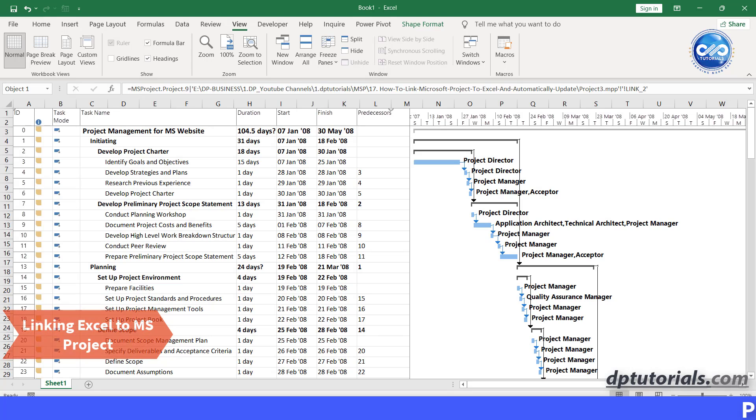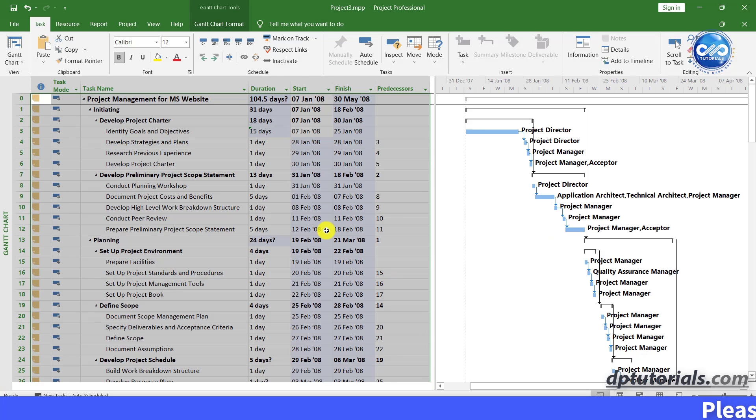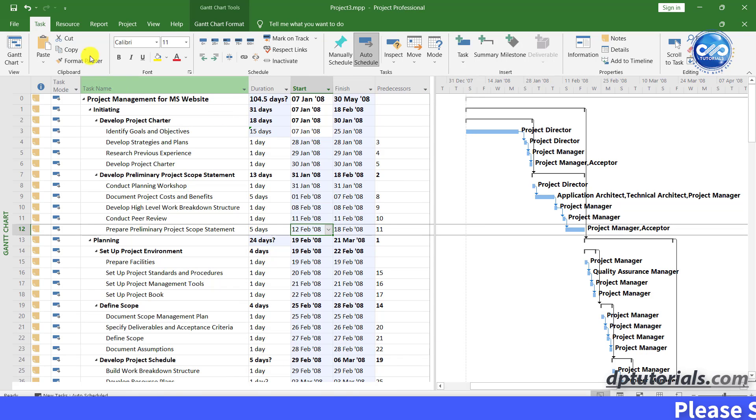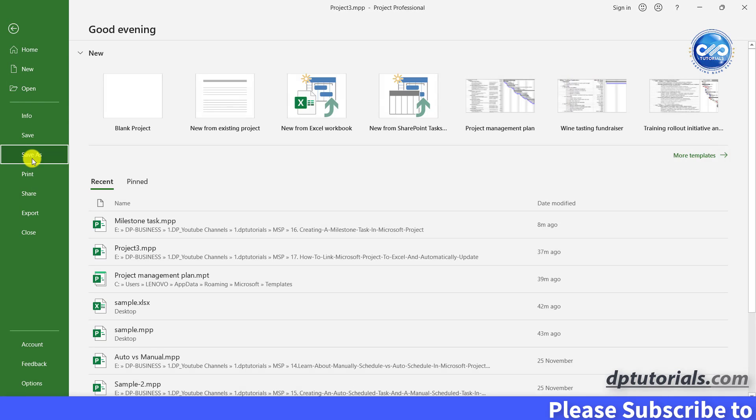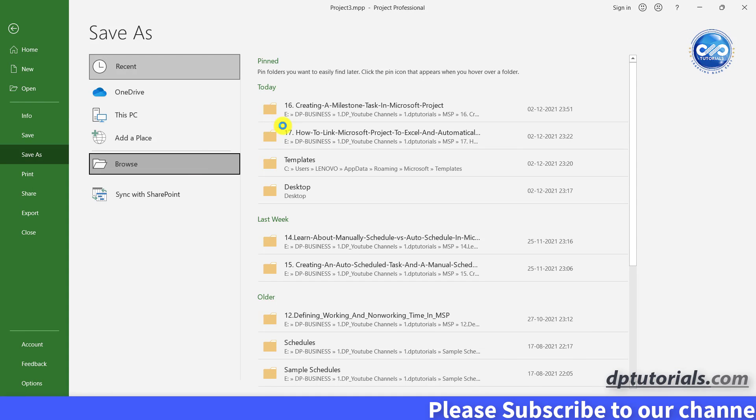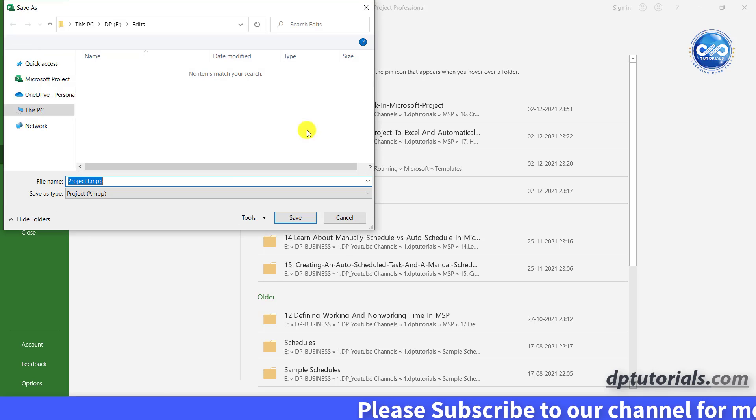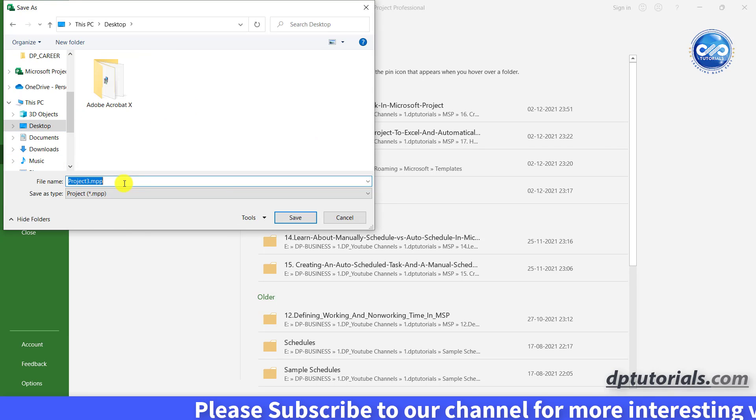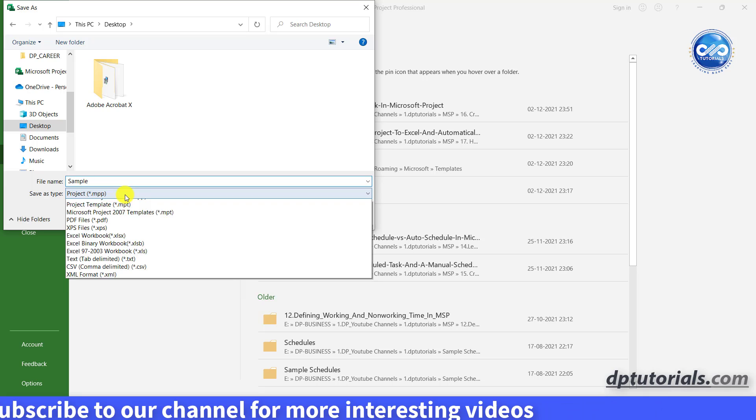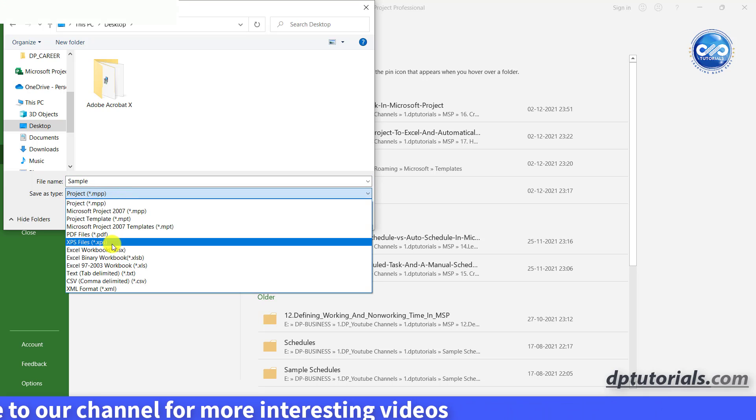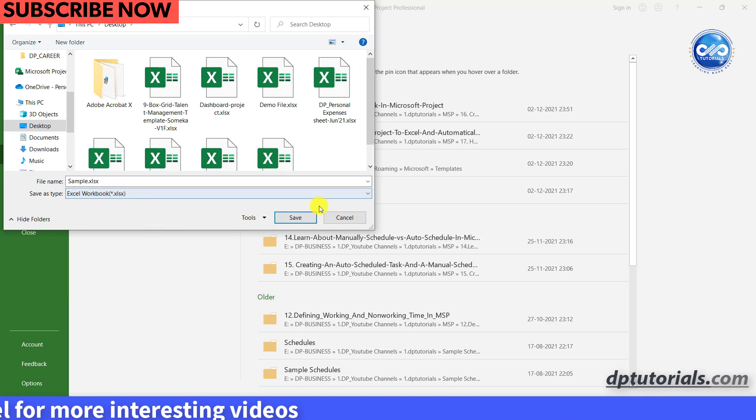First, let us save this sample schedule to Excel. Go to file, click save as, locate the desktop, give a name to the file, say sample. In the save as type, select the excel workbook and click on save.